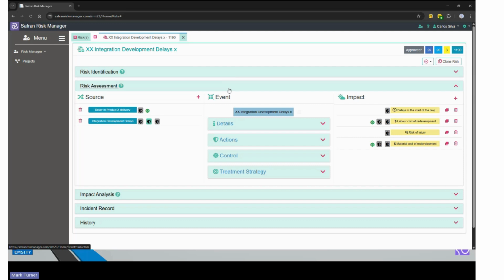They can either prevent the risk event occurring, in which case they are specifically targeted at the source, or they can protect in the event of the risk occurring. So we would essentially visualize this on the left hand side and say these are preventative actions, and on the right hand side to say that these are protective actions. I'll say that again. The ones on the left are preventative actions, and then the ones on the right are protective actions.